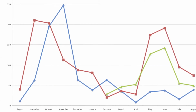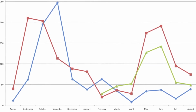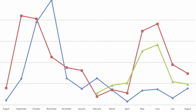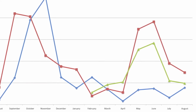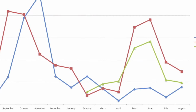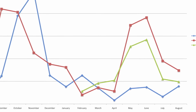I'm an engineer, I have to put a graph in my presentation, so this is one of 2 graphs. This shows the number of RFIs on a month-by-month basis. The first peak is the architectural and structural review, which was done in the first 4 months. At the peak, we were raising 250 RFIs per month. There's then an ease off where we've basically loaded the design team with hundreds of questions. They've gone off to review their drawings, they've gone off to make changes to the drawings, and now they've come